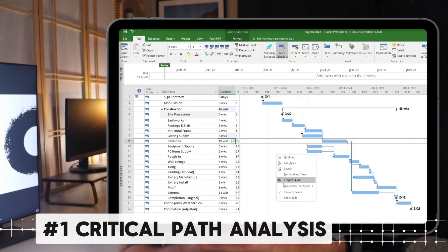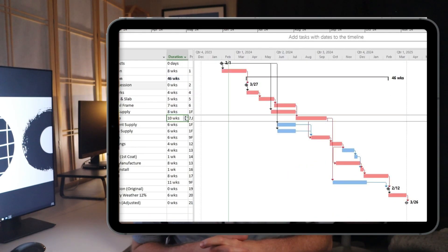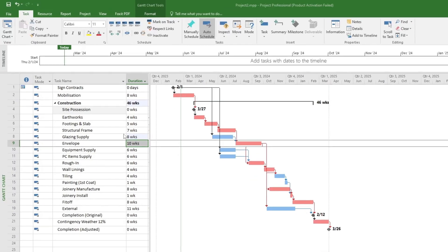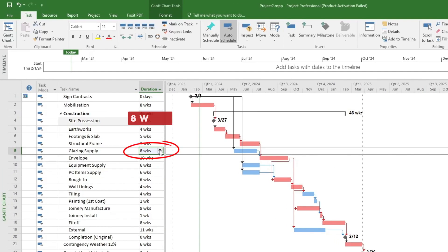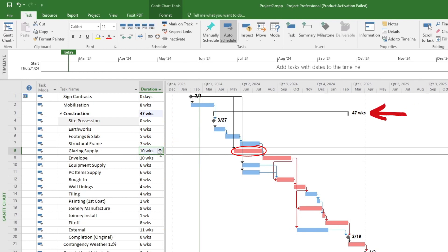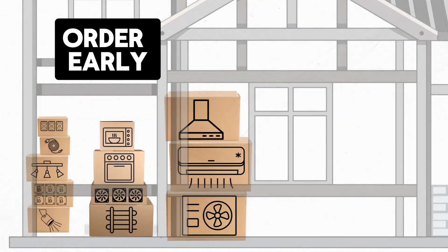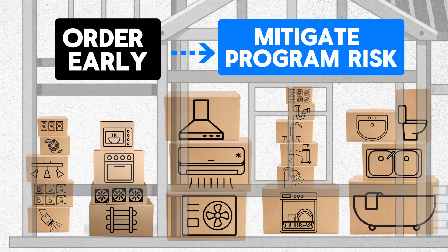So on to our first topic: critical path analysis. I'm using Microsoft Project, which will automatically map and highlight the critical path for you. To illustrate how this path jumps around, let's extend glazing supply from eight weeks to ten weeks — it has now automatically become highlighted and the overall project is longer as a result. To mitigate this risk we should add additional float and factor in ordering this gear two weeks earlier. Equipment and PC items also delay projects because some parts are needed during the services rough-in. As a general rule, ordering and supplying the physical equipment early will mitigate program risk dramatically.